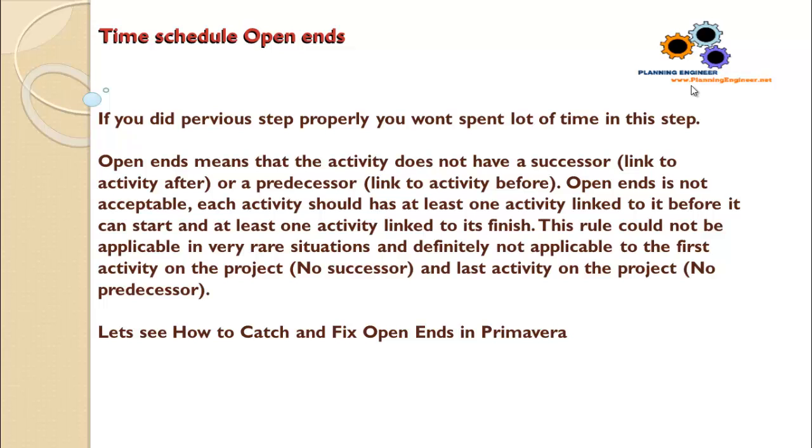Each activity should have at least one activity linked to it before it can start, and at least one activity linked to it to finish.